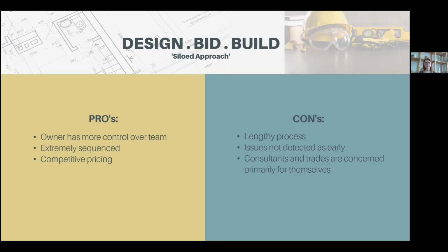The pros of this is the owner, in a sense, has more control over the team, because they will select the design team, they will select the build team. It doesn't come as a cohesive unit. As I mentioned, it's extremely sequenced. And then the pricing may be more competitive because you are going out for multiple bids.